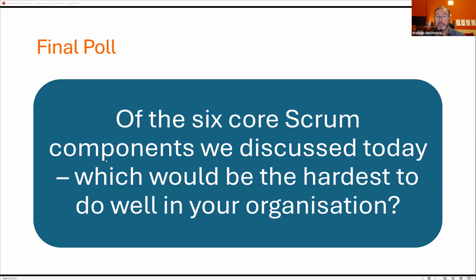Or you absolutely would have things in the product backlog that say, here's a user story, and this one is high risk. It could be high uncertainty or high consequences. So you need to know those because they're going to get pulled into some of your early sprints so that you can nail down that uncertainty and figure that out before it becomes something quite painful or expensive later. So yes, there definitely is room in the product backlog to talk about risk factors.